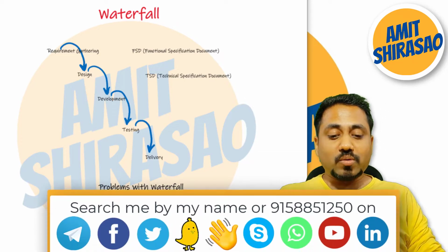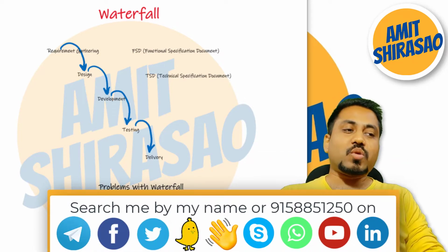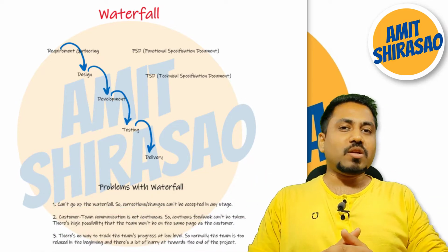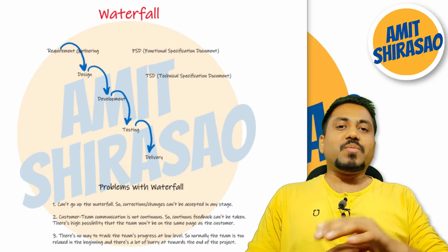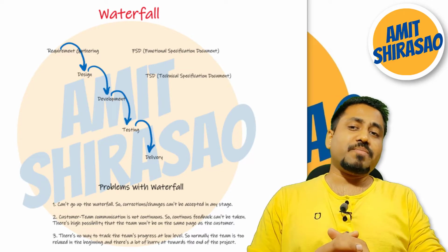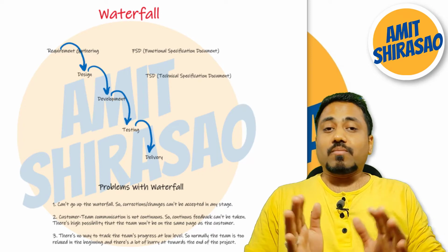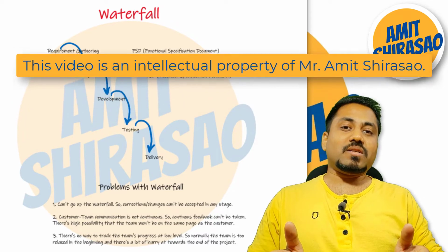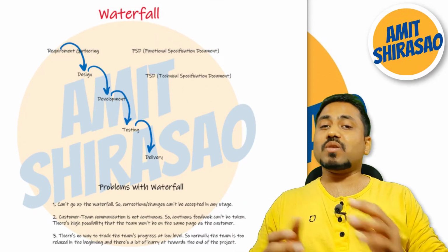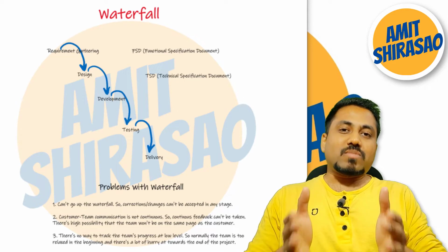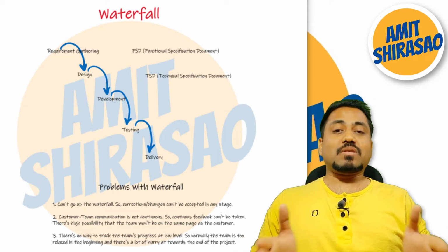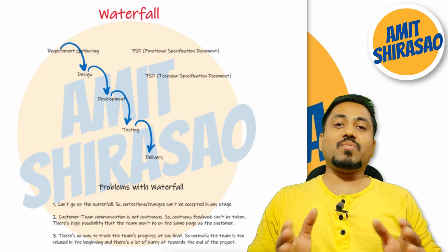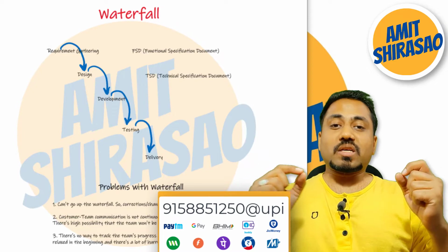Now during the development, they are not even tracked on what the status is, or asked to show something running periodically. No. At max, they will be asked, what is your status, how much code have you written, that's all. But there is no requirement that the developer should show working code to the customer or to anybody. Let us say the development stage is 6 months or 1 year. For that whole year, the developers are not even asked to show working software.